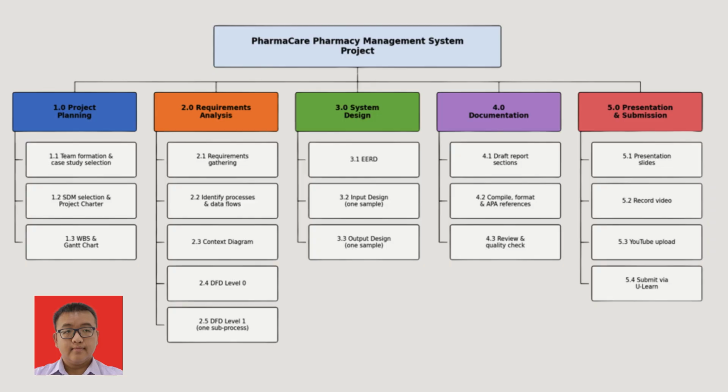Each phase is then broken into work packages. The important point is that every single work package has one named owner. Nothing in this project is left so that somebody will do it. That is how we kept 5 people moving without duplicating the work.